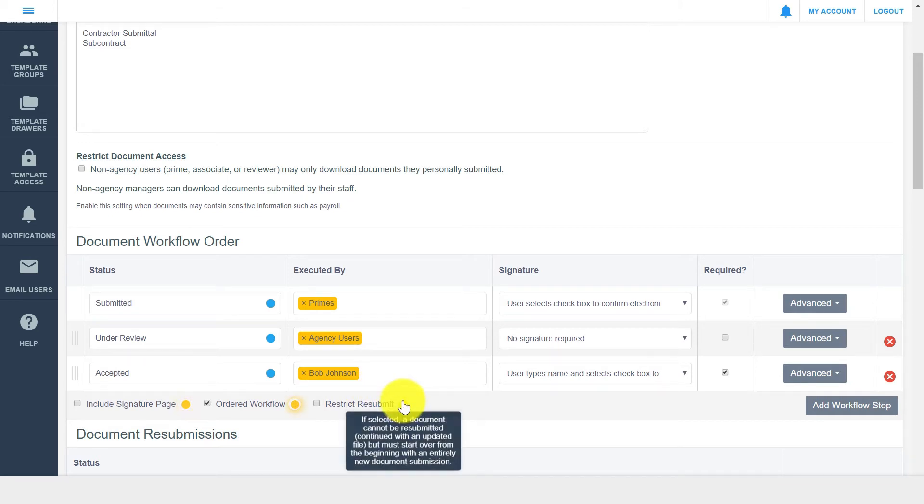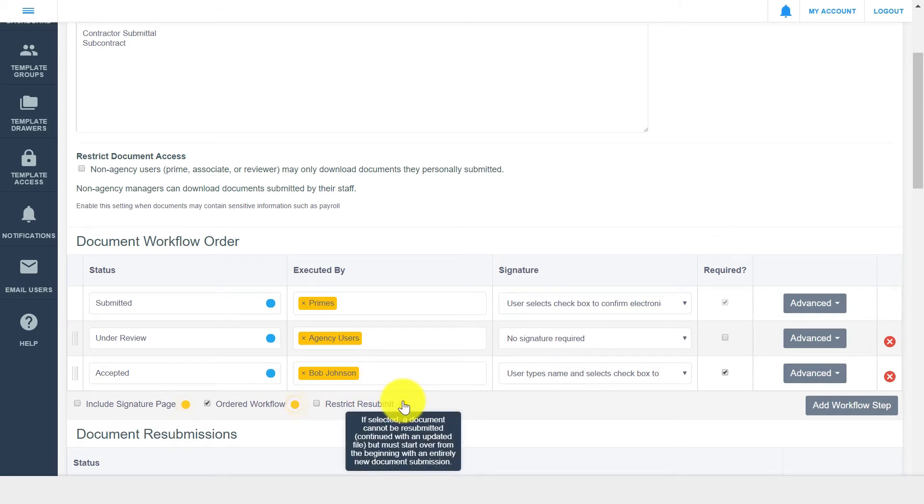The restrict resubmit checkbox can be utilized if you do not want a rejected document to be resubmitted. When you select this option, you will not be able to continue the workflow for a rejected document, and the document must be uploaded as a brand new submission.